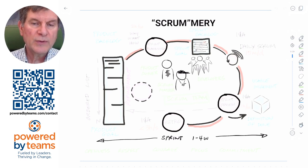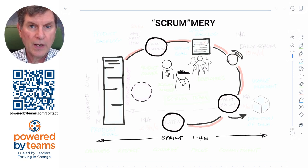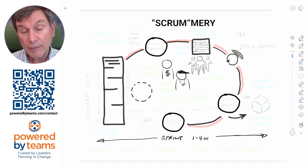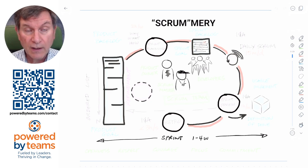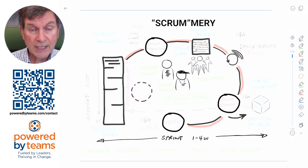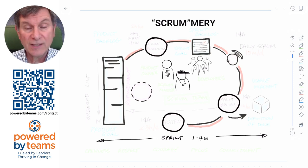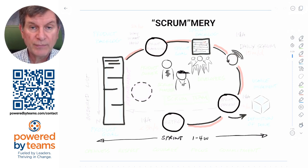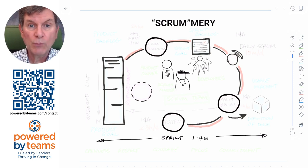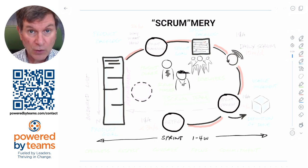You'll probably set the length of that time box based on a few factors. Some common ones might be availability of your stakeholders for feedback, maturity of your team, and complexity of the work. The more complex the work and the less mature the team, the shorter a sprint you want to run, because those are more frequent inspect-and-adapt loops where you can get feedback and keep things on course.